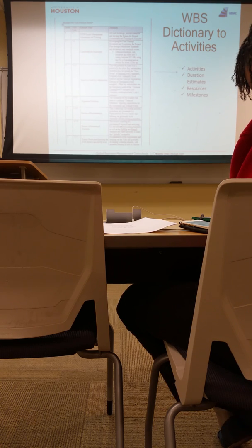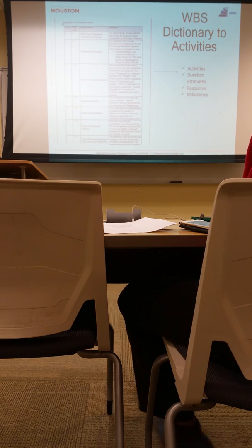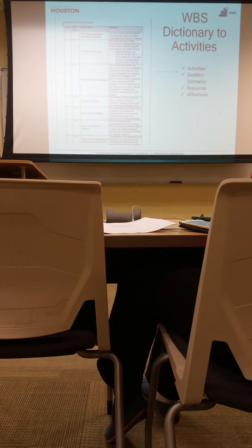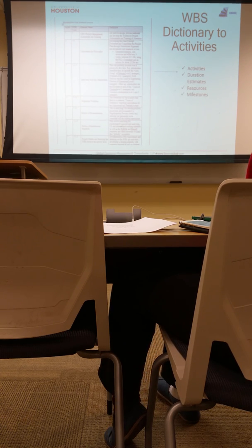this area right here, so that I know if I have to contact 15 people and interview them all, and say it takes, at the very least, 4 hours, because I've got to get a hold of them, get their email, and then have a half-hour interview. I've got to put together a discussion guide. So 15 times 4, at the very least, that's a 60-hour task.